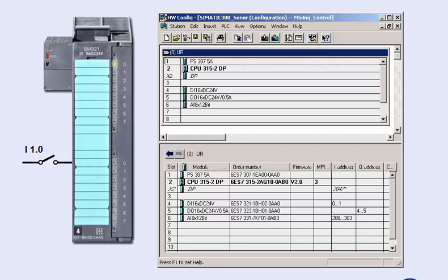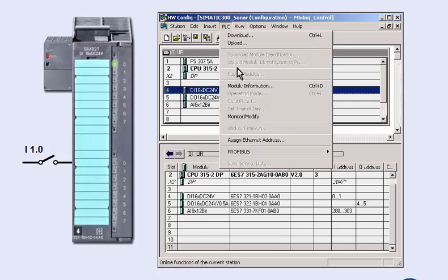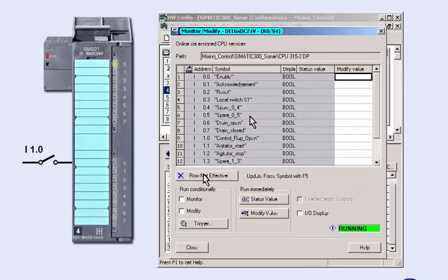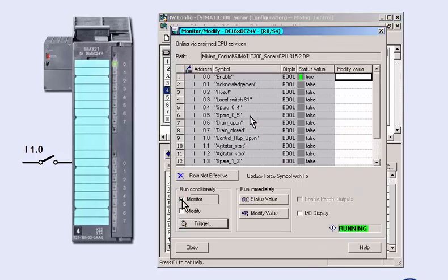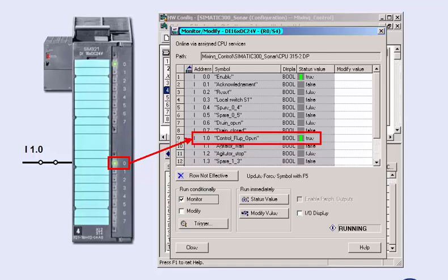Thousands of signals, as occurring in complex plants, can be checked quickly and reliably. We select the digital module and open the dialog for the input signals of the module via the menu item PLC, Monitor, Modify. We select the monitoring mode and can now monitor the switching operation in the plant directly from the programming device. This enables you to check the signal path, for example from a mechanical end position switch over the module up to the process image input and output table of the CPU.